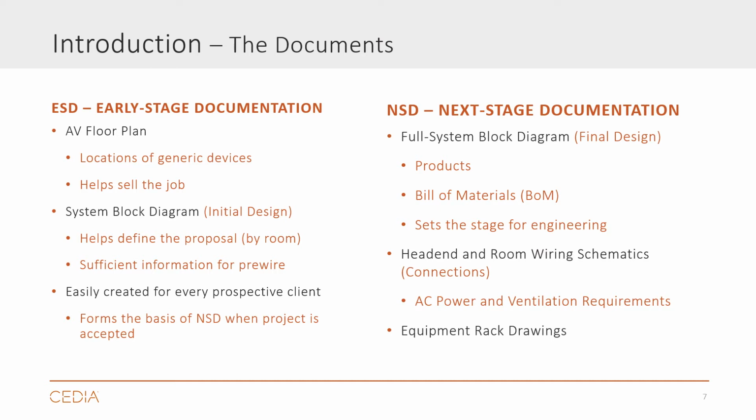Notice the overlap between ESD and NSD. They each have a block diagram section. In ESD, you may not yet know specific products in your design, but you will need to know the products in NSD before moving forward.